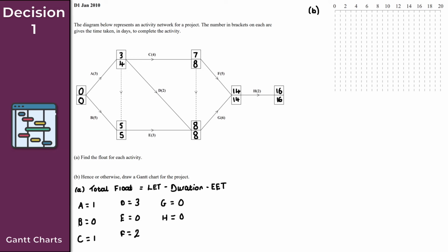So starting off then, activity B here. So we always go in the correct order here. And basically, you can trace the path here. I'll do this in a different color just so you can see the critical path here. I'll do it in orange. So the critical path here is as follows. So we go through B, then we go through E, then we go through G here, and then finally we go through H, okay? And this path here is essentially what we're presenting then along the top row here, right?